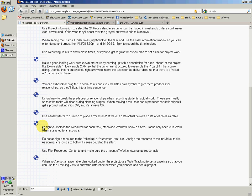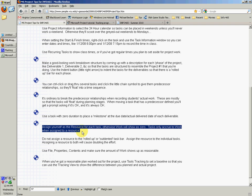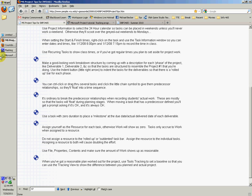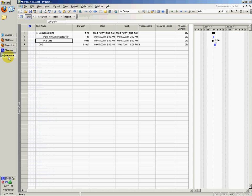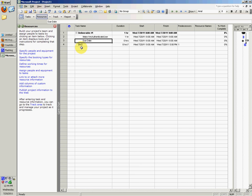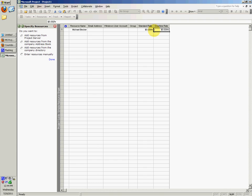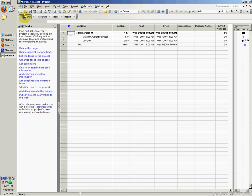You want to assign yourself as the resource for each task, otherwise work will show a zero and task will accrue to work when assigned to a resource. Do not assign a resource to the rolled up or outdented taskbar. Assign the resource to the individual tasks only. Assigning a resource to both will cause doubling the effort. You can go to Resources, specify the people and equipment, type your name like Michael Becker, and standard rate supposed to be 65.